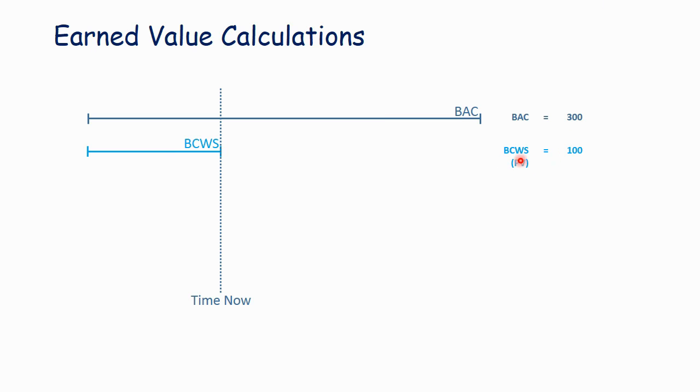All right, so in this case, let's say the budgeted cost of work scheduled is 100 hours, or the planned value in the new nomenclature is 100 hours. Budgeted cost of work performed is what is actually accomplished. And if you recall in the Microsoft Project schedule, we had a column where we could put in percent complete. So this is everything that is some percent complete. If it's an XY method, it is either started or finished. So this is what you've actually performed. And let's say this is also 100 hours.